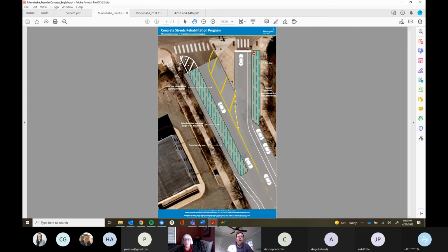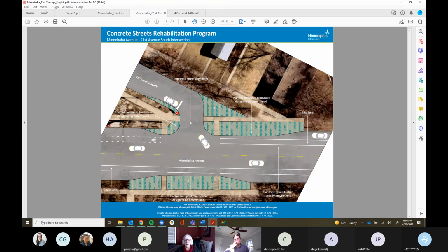There is, I forget the exact dimensions, but it's a couple feet wide in circumference, a water main that runs immediately underneath of that. And that would just involve pretty much a complete reconstruction of this portion of the roadway, of which this project just doesn't have the scope or budget for. So we really need to work in other places. So we identified closer to the curb areas, and that's kind of how we ended up with the design that we have shown here. Our other major location that we have here is Minnehaha and 21st.